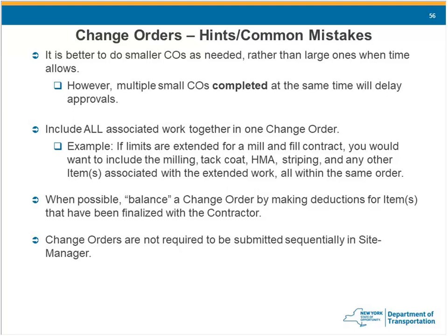But also, just in general, if you have an increased change order, which is starting to get pricey, you can start searching around in your ConR 22, maybe looking for items that you're not going to use all of. You can start saving some of that increase. Put the decreased items in the change order and try to balance it out the best you can. Can't always do that, but it's good practice to at least look. Now, don't go taking stuff out that you could potentially need in the future, but if you know you have something that's going to decrease, and you have an increased change order, go ahead and throw it on that order as well.